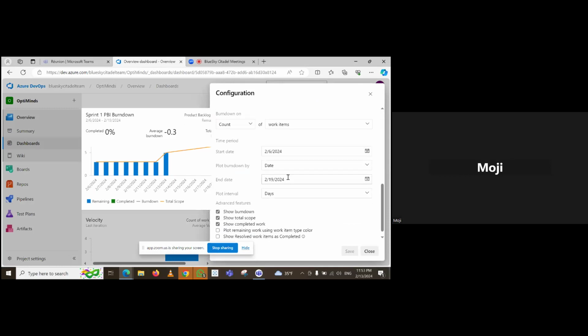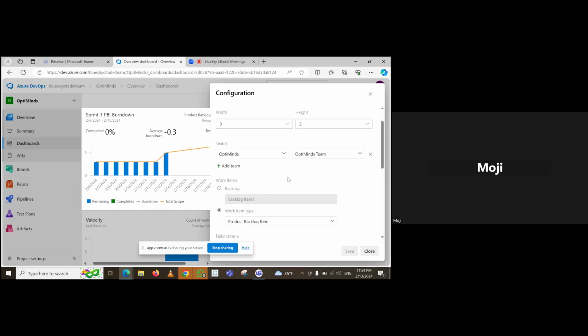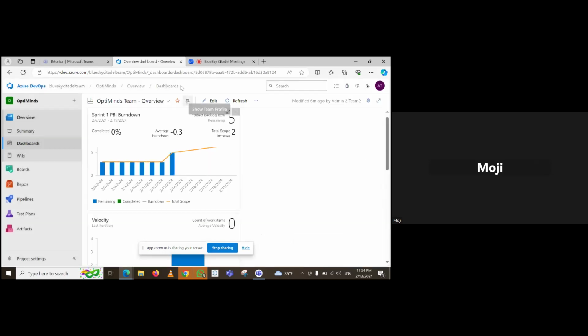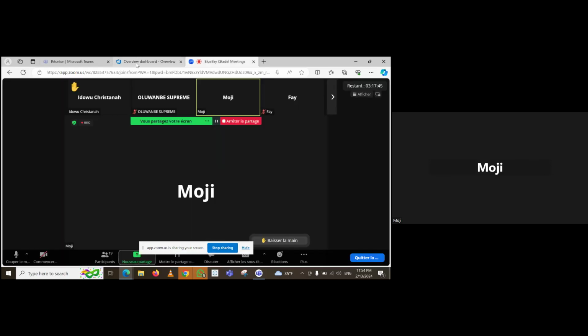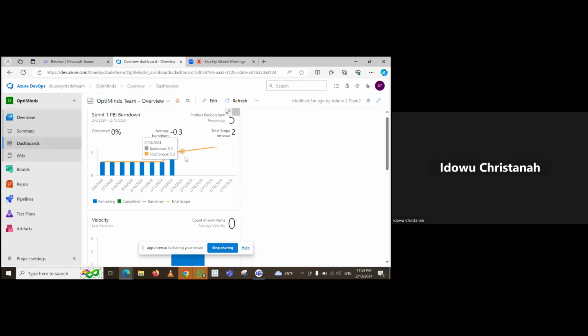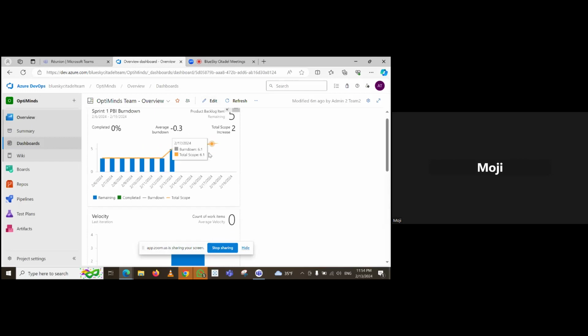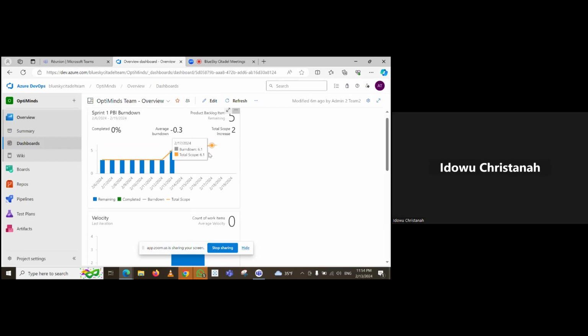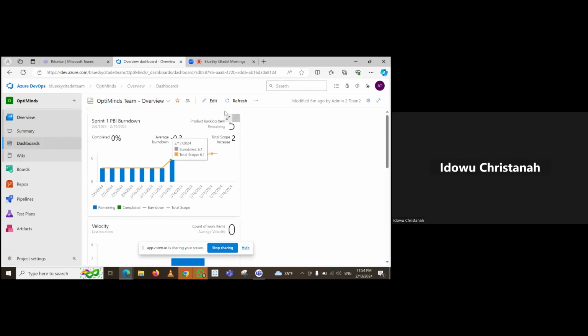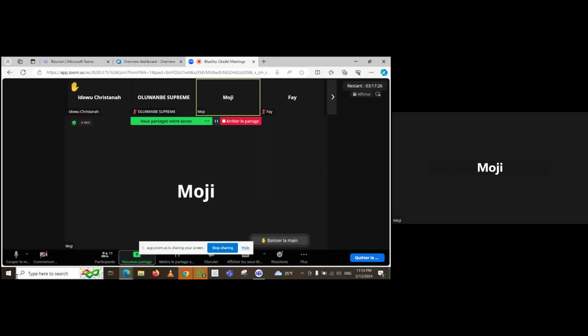No, it has nothing to do with that. Your minus 0.3 is because you've added more. If you look at today, you've added more stories to the sprint. That's why you've had your minus 0.3. Okay, I just want to be sure that we are not missing out anything. Thank you. Yeah, if you check at the start, nothing had been done till today, and then today you've added more to it. That's why it's taking it to minus. Okay, thank you. You're welcome.